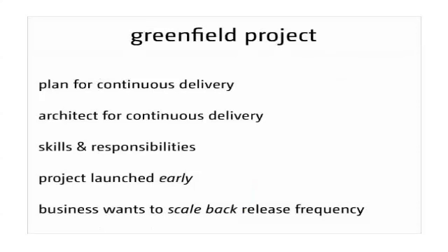There are still some problems with this project. One is that we need someone who's full-time working on the deployment pipeline. And it turned out there was one person on the team who had the skills to understand how to automatically provision environments with Chef, how to build deployment pipelines, how to do continuous integration properly. And he became the bottleneck on the project in some ways. And so skills are a big problem in continuous delivery too.